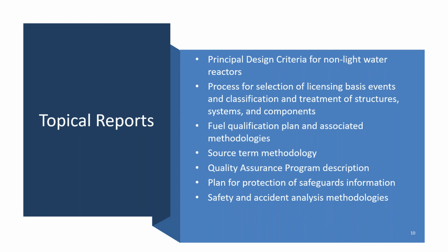Regarding safety and accident analysis, these should include testing of applicable SSCs and validation and verification of associated engineering computer programs. You should note that 10 CFR 50.43(e) requires applicants to demonstrate that sufficient data exists on the safety features of the design to assess the analytical tools used for safety analysis over a sufficient range of normal operating conditions, transient conditions, and specified accident sequences.